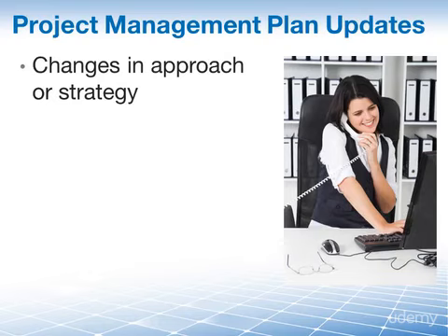For instance, a stakeholder may tell you that he feels uninformed and that he is not really sure what this project is all about and where you are heading. This means you have to increase your regular communications with that stakeholder. As a consequence, you will update your communications management plan and address the information needs of this stakeholder accordingly.